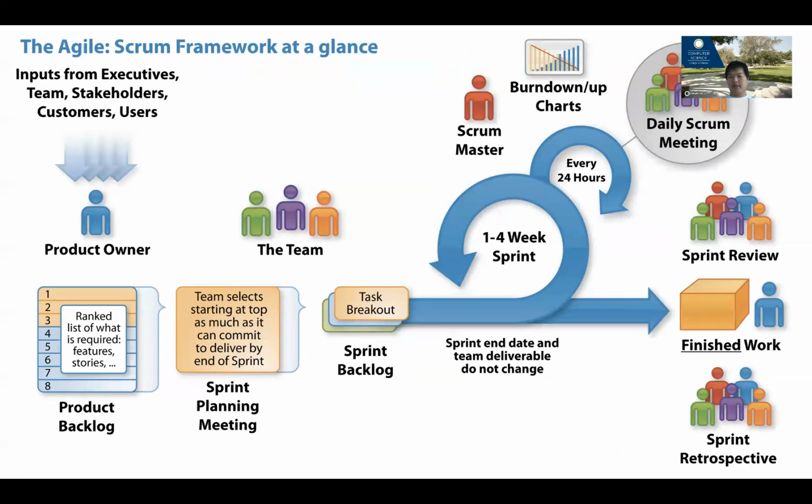That's why Agile is the name. So we want to be faster. Okay, we want to be swift. We want to be very flexible. All right. So as I mentioned, the core fundamental idea about this Agile development is that I want to break this long, big cycle into smaller cycles. And every cycle could be anytime from 1 to 4 weeks. That's very typical. 2 weeks or 3 weeks are more common. And sometimes you see 1 week or 4 weeks.